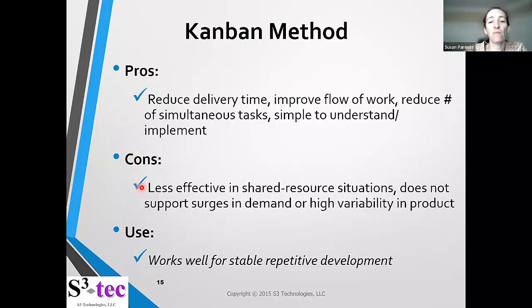Some cons: it's less effective in shared resource situations. So yes, if you have a dedicated team of 5 people, it could be less effective to use the Kanban method than some other methods. It also doesn't support surges in demand or high variability in product.